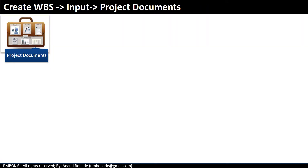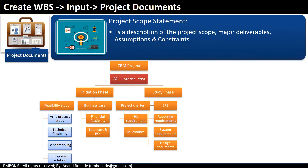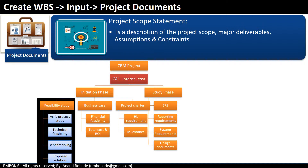Project documents required as inputs are the project scope statement and requirements documentation. The project scope statement is a description of project scope, major deliverables, assumptions and constraints. You take deliverables from the project scope statement and decompose them into smaller, more manageable components. For example, a deliverable like feasibility study report was decomposed into work packages like as-is process study, technical feasibility, benchmarking, and proposed solution. In a house construction project, main deliverables include foundation, building structure, rooms, and swimming pool. A deliverable like swimming pool can be further divided into construction of the swimming pool, setting a temperature control system, etc.